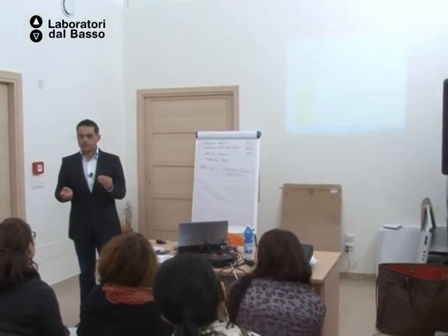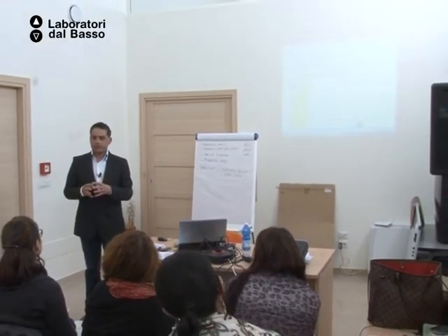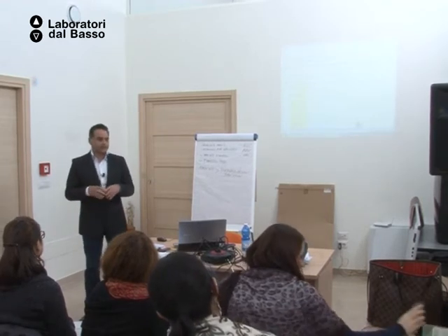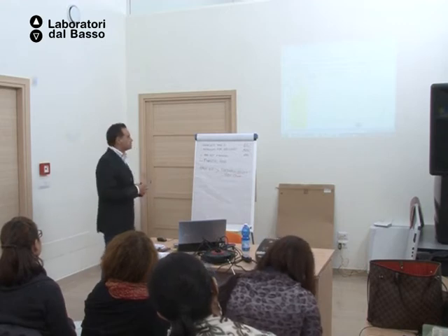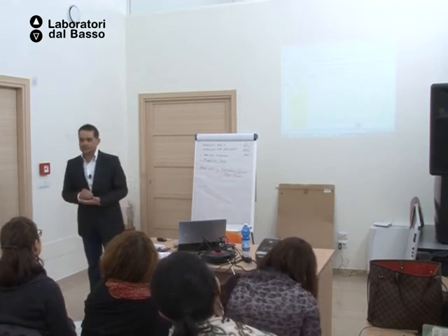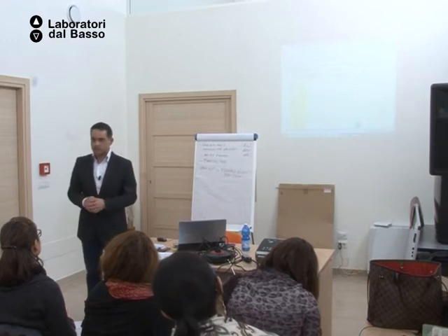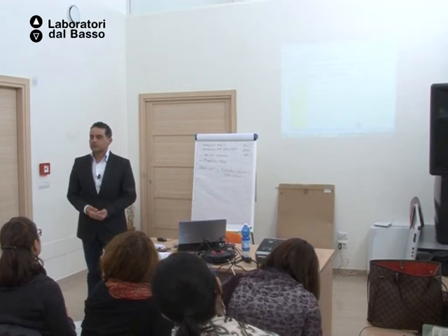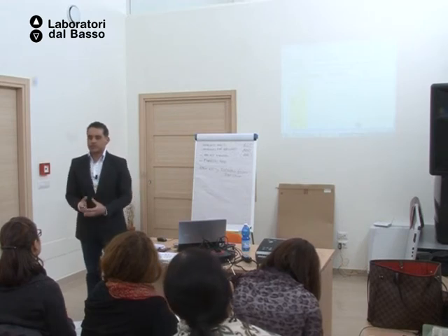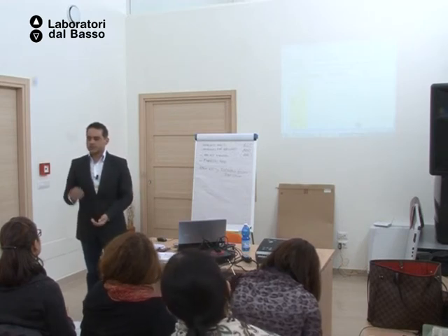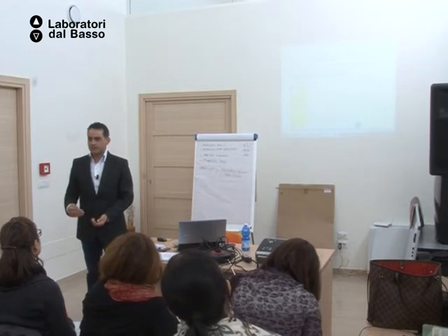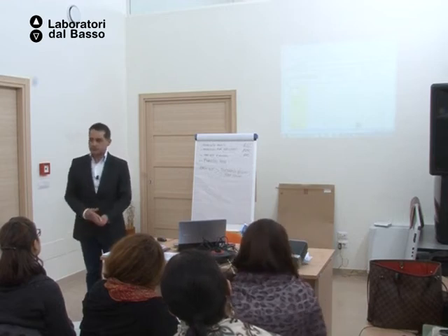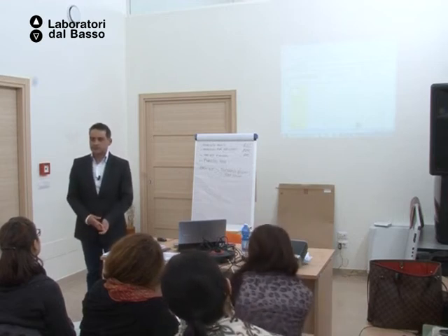For example, if you work on the concept of a learning method, it will be implementation. If you work on the survey, for example, the mapping of good practices, this is implementation, etc. Or, for example, if one of the main results of the project is to build a set of videos, movies, it will be implementation. This is production of something. Okay? Is that clear?